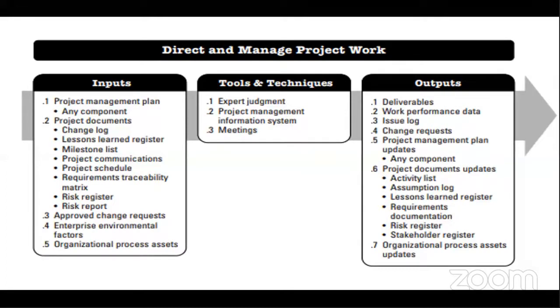All right, so the team will get to improve their knowledge via risk management, schedule management, communications management, milestone management, and all of that. Then you have another input called the approved change request. You remember your assumptions log, where you assume this can happen, this can happen. Now, when those things begin to happen, you need a change request form for the updating of those changes in the project management plan. And please note, not all changes will be approved. Some changes will be approved, some will not. It is a function of what the project stakeholder or project owner wants.